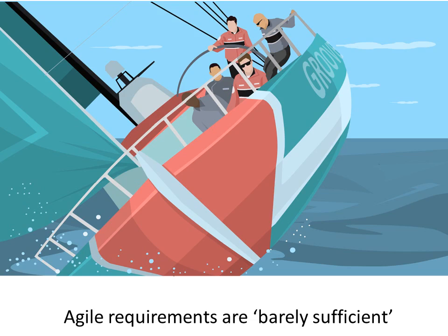While the requirement in Agile is what you call barely sufficient, meaning you don't actually want to make it comprehensive. You want it as a talking point. You want the requirement, the user story, to be something that can be the talking point between the team and the product owner in defining what is in his mind, what he wants to achieve when he said that story.